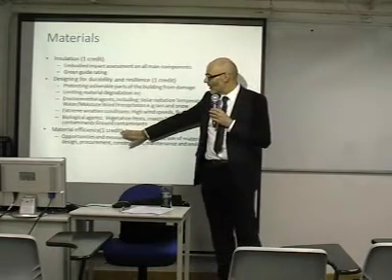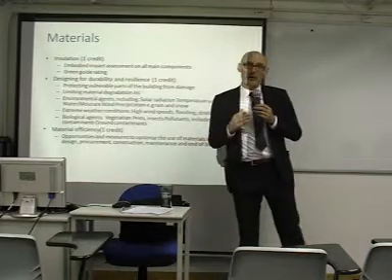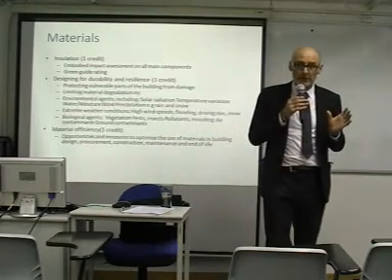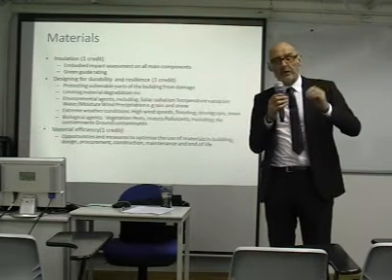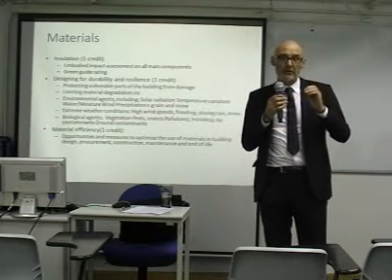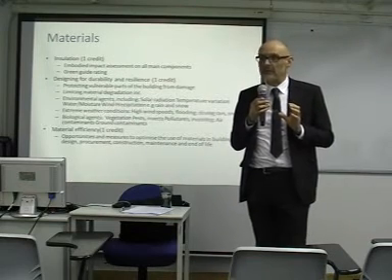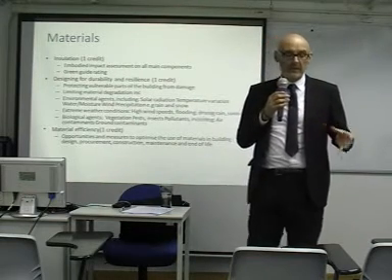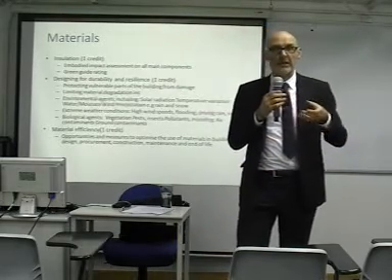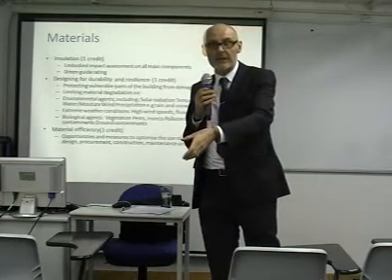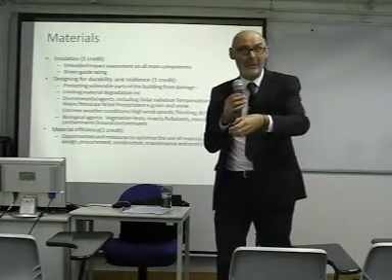And obviously, material efficiency, avoiding waste. One of the things you can go for is a zero waste approach. It's interesting to just consider how much waste buildings produce. Adopting zero waste is very useful. So a UK site today will not accept any waste materials. Suppliers bring the materials on the pallet and they take the pallet away. If the materials are shrink wrapped, the polythene is taken back by the supplier. The cardboard is taken back by the supplier.